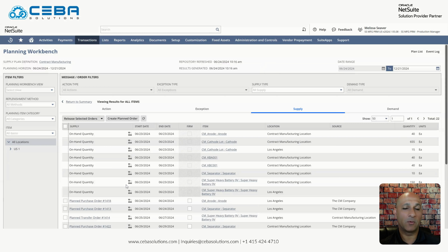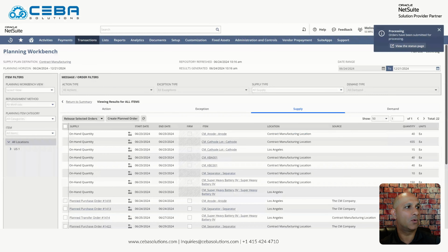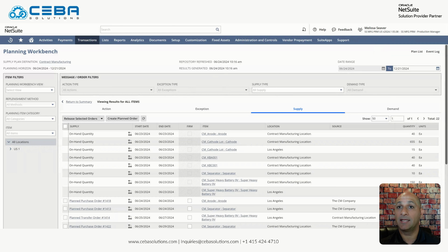Now let's go ahead and execute on some of these planned transactions. So once I'm happy with the transaction sets that have been suggested, I can go ahead and either drill down and edit some of these and review them in detail, or I can release them directly from here. So I can go ahead and release these, and these will release the 2 orders for me for processing. And once those planned purchase orders have been submitted, I can actually go ahead and then create the actual purchase orders for those.